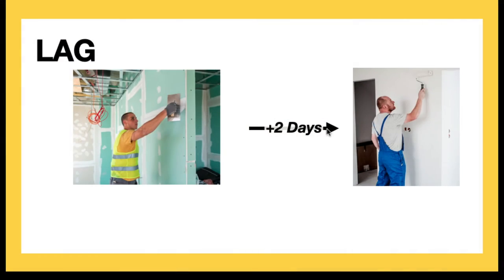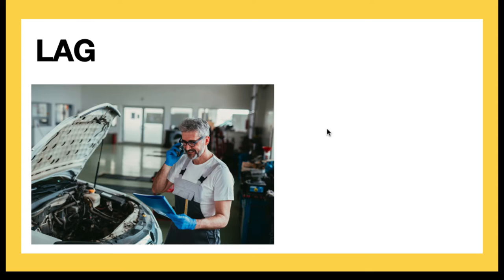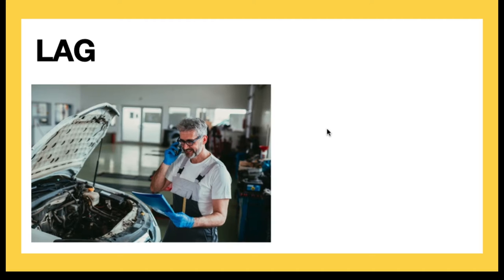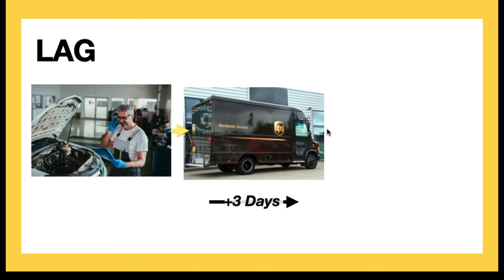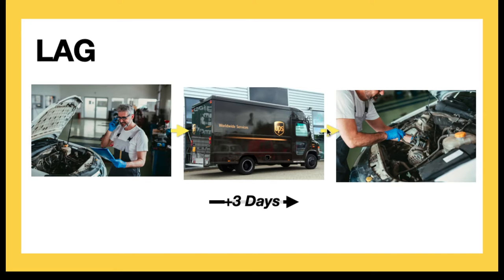Let me give you another example. Let's say that you take your car into a mechanic, and that mechanic finds that they, in fact, need to call the manufacturer of the car and get a part shipped out. So they place that telephone call, and it takes 3 days for the part to be delivered. Then the mechanic can actually install that part in your car. The lag is the 3 days that it took for shipping.